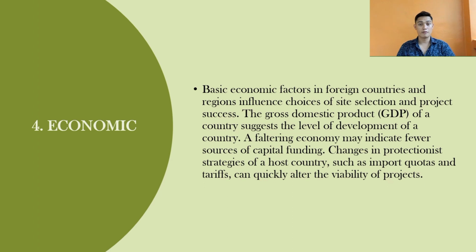Fourth is economic. Basic economic factors in foreign countries and regions influence choices of site selection and project success. The gross domestic product of a country suggests the level of development of a country. A faltering economy may indicate fewer sources of capital funding. Changes in protectionist strategies of a host country, such as import quotas and tariffs, can quickly alter the viability of projects.